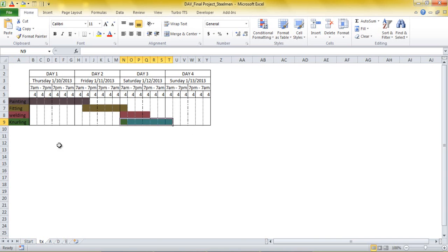We are assuming a 24-hour work cycle. Within each shift there are 4-hour blocks. So this project is being tracked in terms of 4-hour blocks, which also means that if there is a particular task that requires 21 hours, it will take 6 blocks instead of 5, because the 5 blocks would be required for the first 20 hours of work, and the sixth block would be required to complete the 1 hour of work.